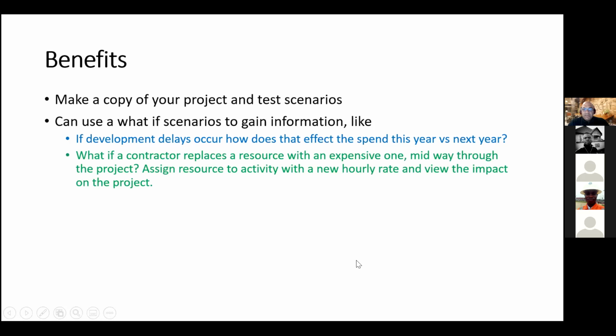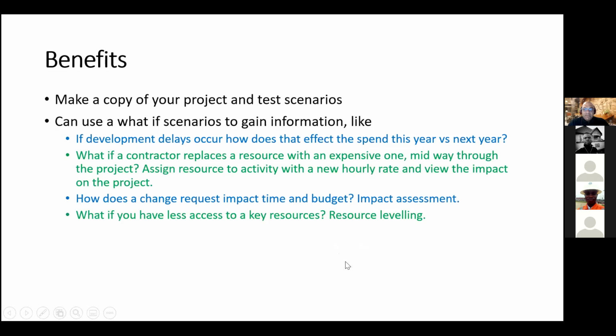If a contractor replaces a resource with an expensive one midway through the project, which happens many times, you can assign a new resource to an activity with new hourly rates and view the impact on the project. How does a change request impact your time, impact your budget? You can find this out in Microsoft Project. What if you have less access to a key resource? Do you need resource leveling? You can find this out in Microsoft Project. So at the end of the day, this setup helps you save time in minutes, not in days or weeks or months.